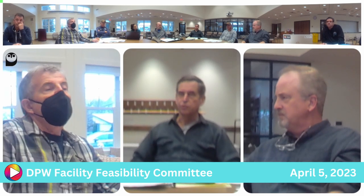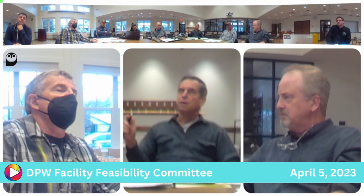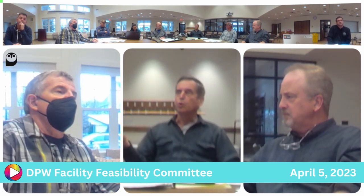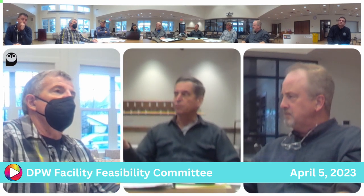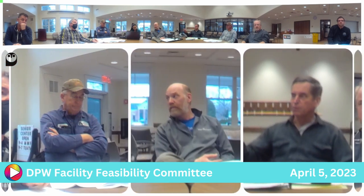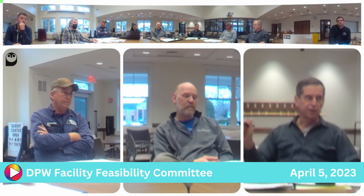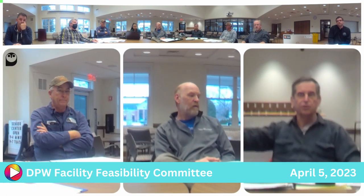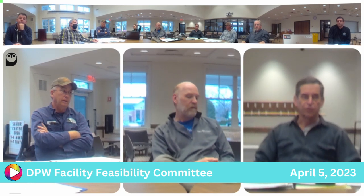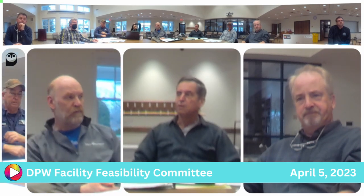And there's also a step in between there. In choosing an architect or an engineering firm to design this, we just can't automatically. We have to go to bid. Correct. Not bid, well, no, proposals. We just can't choose this company to do the rest of the work. We have to go out and bona fide interview firms to do this, just like we had to do for the OPM too. Yes, both.